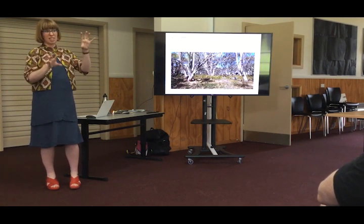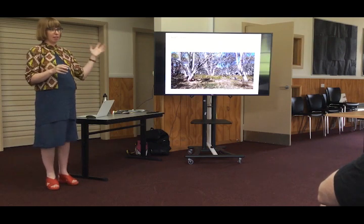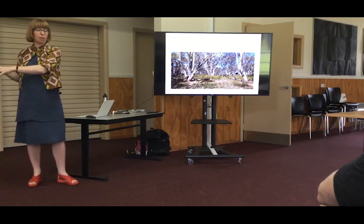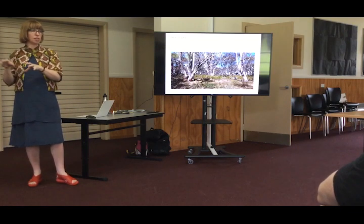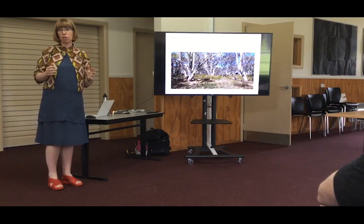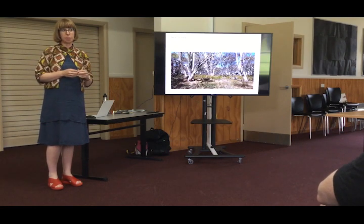Yeah. And then we can prioritise things from there, saying, all right, well, I really think this town entrance thing, this part needs to be done first, and that one can wait a couple of years. As long as it still functions like this, we can section out staging and planning of different precincts like that as well.